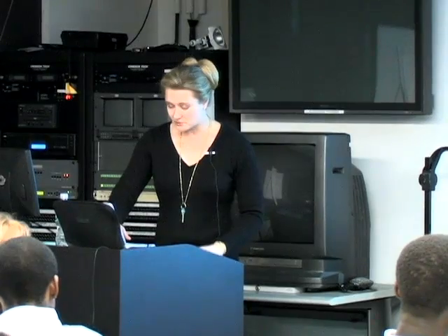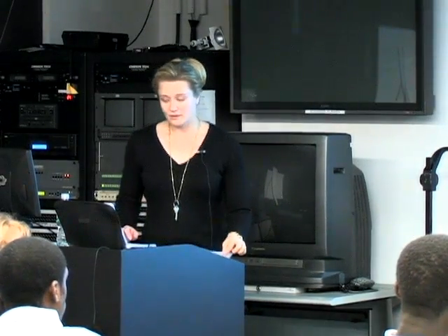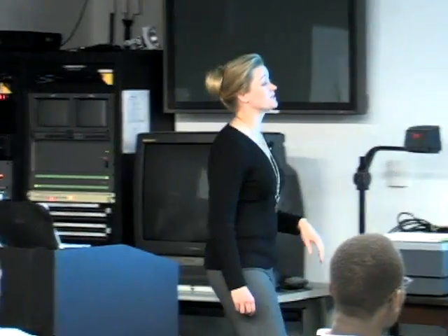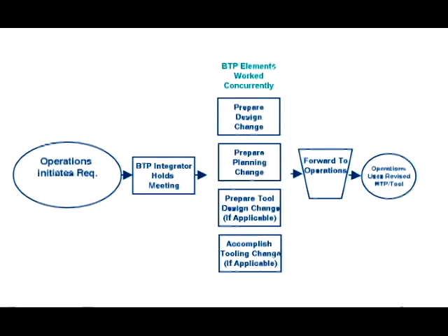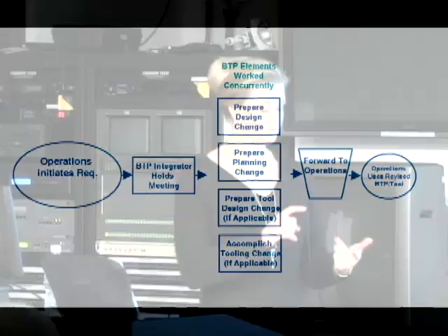So applying some of the tools of value stream mapping, the F-16 build-to package process was reduced down to something like this. Now we had single piece flow going through the system. We had an allowance for parallel processing of tasks rather than single processing of tasks. Concurrent engineering principles were brought in to help achieve this kind of leanness in process, as well as co-location of all the various units between design and manufacturing and quality that needed to be co-located to accomplish this.